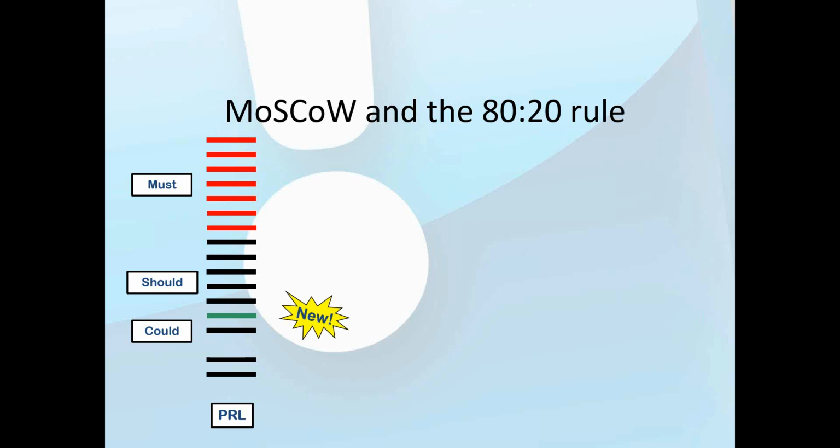So from now on, once you've heard this webinar, anytime anyone says, I've changed my mind, and you're using MoSCoW, quite simply say, that's great news, really pleased about it, we're going to get a more accurate solution, or do that in your own words in terms of what works for you. And then the 2 questions you're going to ask them are, what is it that you want us to trade out or remove from the PRL? And the second question you ask is, and what's the priority on the new requirements?